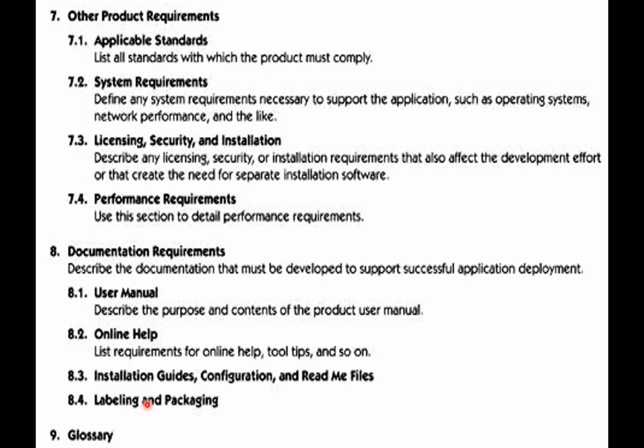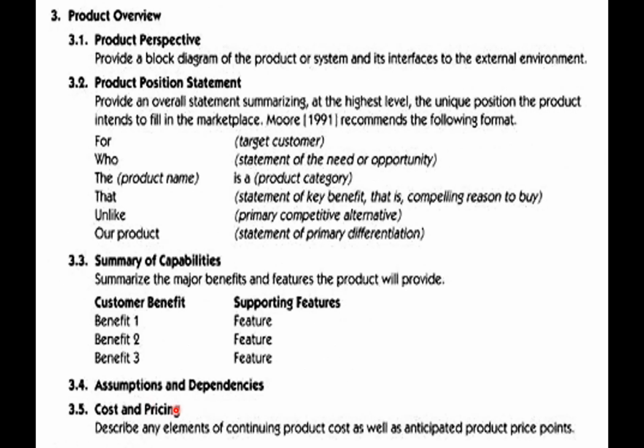And it's actually going to be used, as you can see in the part about cost and pricing, for something called a feasibility study as well. And then it goes to executive management. At this point, we haven't really begun the project itself, because at this stage, we might decide to pull the plug on it. We might decide this is not the vision that we have for the project, or maybe there's a similar project or similar software that we can just buy and accommodate a little bit. Or maybe it's just going to cost us too much, or maybe right now is not the time for it.